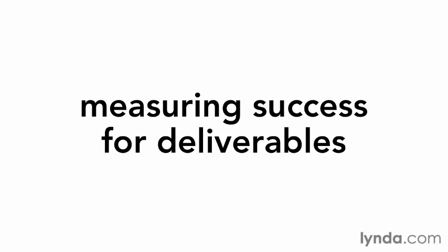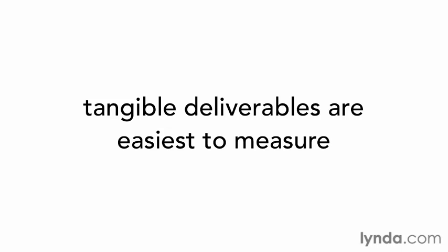Once you identify a project's deliverables, you also need a way to tell that what you get is what you want. Success criteria may be fairly simple and straightforward. Tangible deliverables with built-in measures are the easiest. For example, with the relocation, one success criteria is receiving a building permit from the county government. If you instead get a letter from the county asking for changes, you know you have more work to do. Fortunately, many small project deliverables fall in this category.